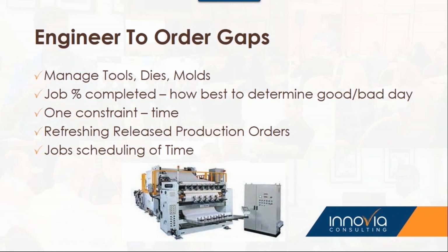And then how best to complete time, how are we doing on schedule now? With it, and this is an extreme, with 2,000 drawings, how do I know I'm on schedule? And we landed on, it sounds kind of strange, but again, you don't have to always have hours be your measurement. It was how many drawings we got done each day to know whether we had a good day or bad day.